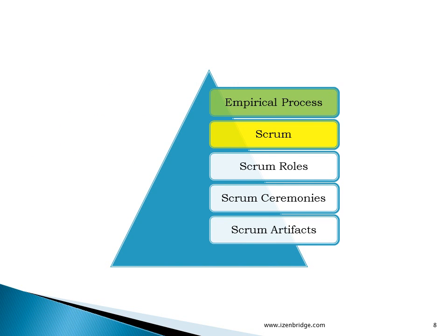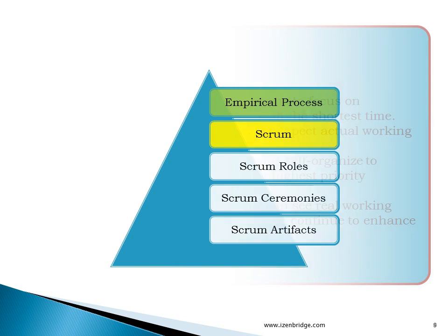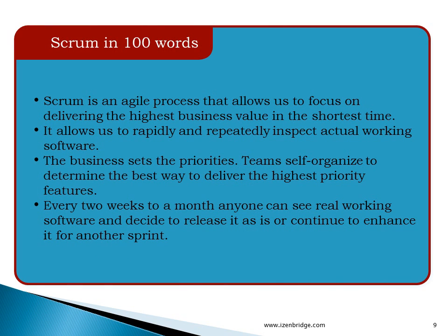So let's talk about Scrum, our second. Scrum is an agile process. It's one of the agile methodologies. It focuses on small iterations of 1 month or less. So 2 weeks to 1 month. 1 month is the default time frame which is given to the Scrum iteration. It works in a framework where business sets the priority and the team works to deliver those priorities to the business by way of self-organizing themselves.